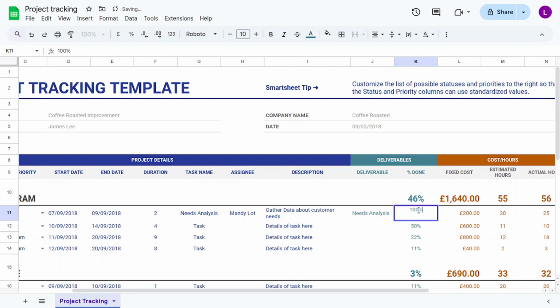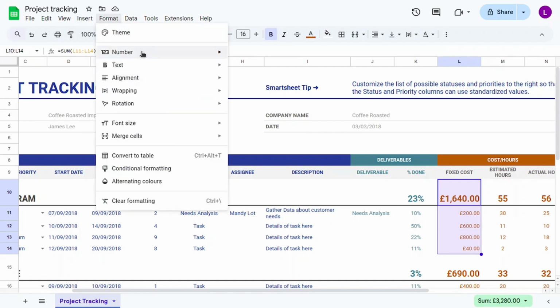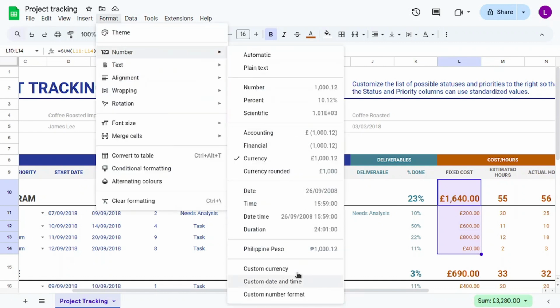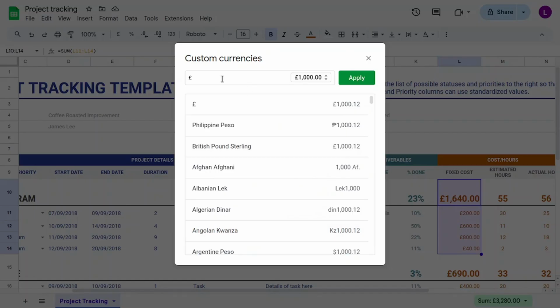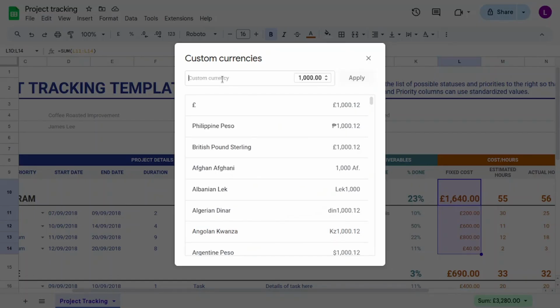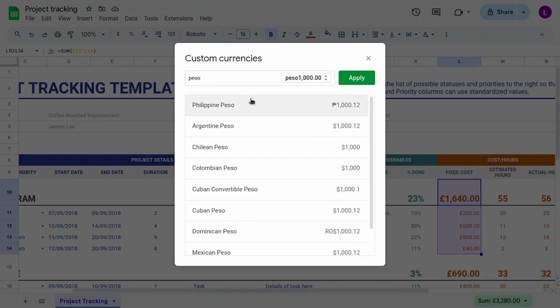So here guys, you can also add a simple risk register, a great way to stay ahead of potential issues. In the new sheet, you'll create columns for risk description, likelihood, impact, owner, and mitigation plan. By keeping track of risk, you can ensure nothing catches you off guard.